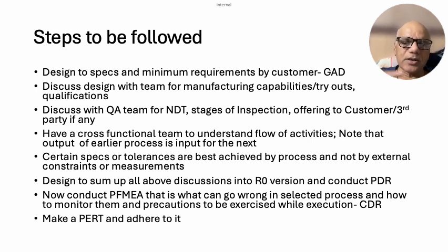And it also gives the interconnectivity and interdependency of each part, sub-assemblies, assemblies and the final product. And the buffer, as you know, we keep only at the end. All other buffers are required to absorb any delays by improving the processes, by deploying more resources, so that only at the end we have sufficient time or a buffer to conduct a recovery.